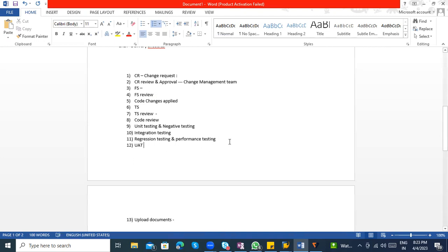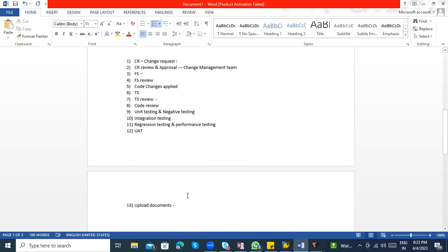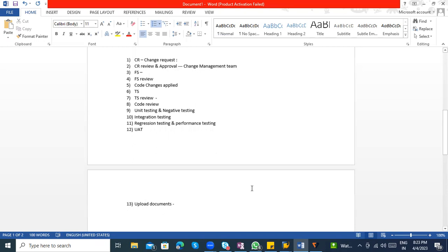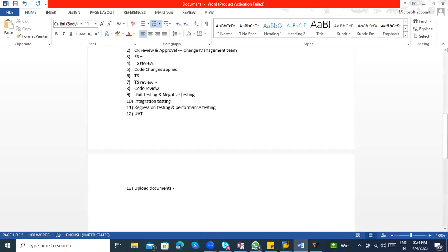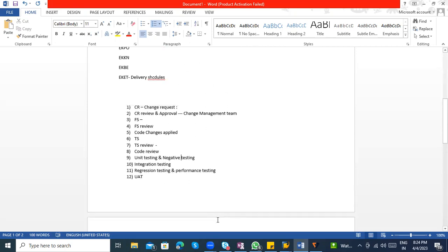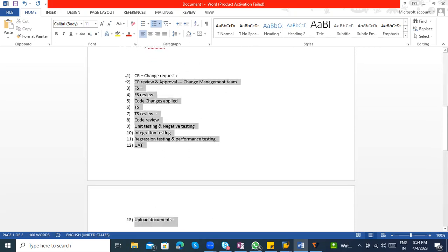Wherever you completed this, all will be updated in the CHARM. There are 4 to 5 steps: initial analysis, then code changes, then code testing initiated, testing completed, UAT completed. Only then will it finally go for the production deployment. That is the process of all these changes.